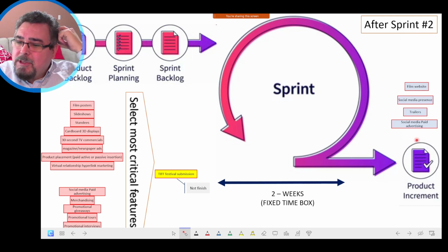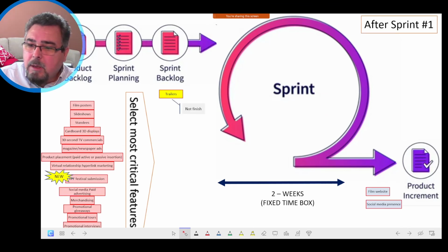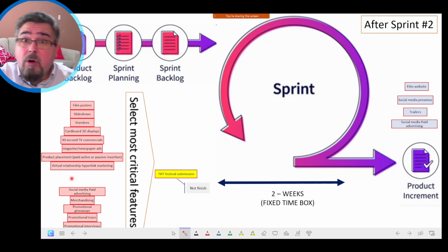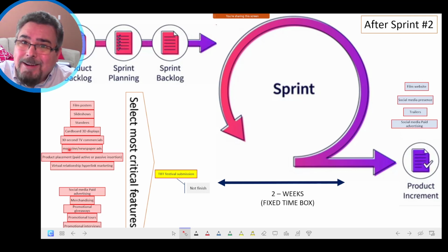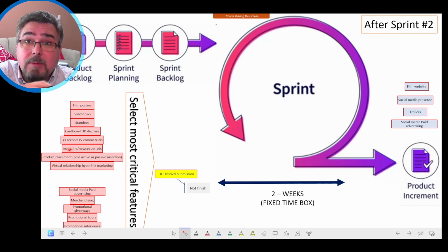They will be selecting some other components, picking the components that the customer says, I want this, that, and that. Usually the product owner is the person that will be telling, oh, that's a high priority, that's a low priority, let's do the high priority first.